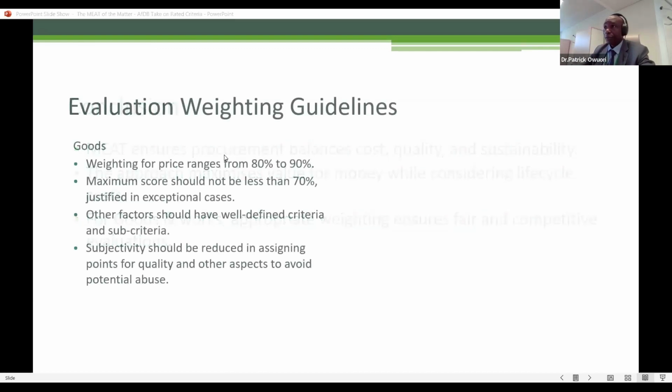Okay, so I was mentioning that if you look at the FIDIC guideline, they have a mechanism where they have certain adjectives that describe the proportion of approaches to how to address the issue of weighting. So, for instance, you'd have a proposal where the technical aspect is rated as excellent, and that is assigned a weight like 80%. Good, a rate of 70%. Fair or poor, a weight of 50 to below 50%.